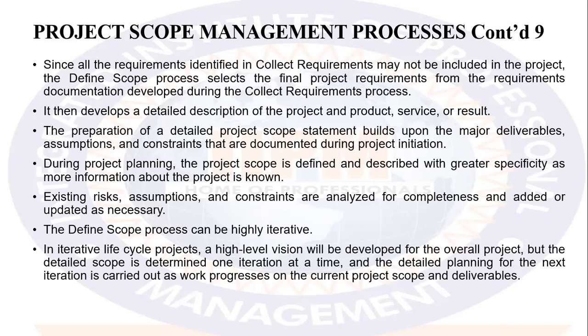In iterative lifecycle projects, a high-level vision will be developed for the overall project, but the detailed scope is determined one iteration at a time, and the detailed planning for the next iteration is carried out as work progresses on the current project scope and deliverables. All right.